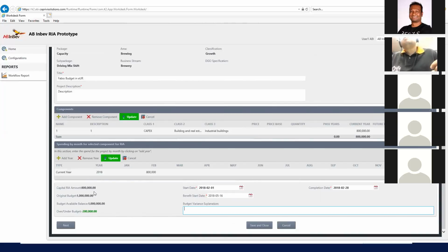it's going to look like the project manager is potentially even over budget, right? That's one of the reasons why we force the people to enter the RIA in the currency. But we can certainly display US dollars here. That's not a problem. But this is how you manage a project manager. Okay, he's looking at that. He thinks he's doing a good job here.